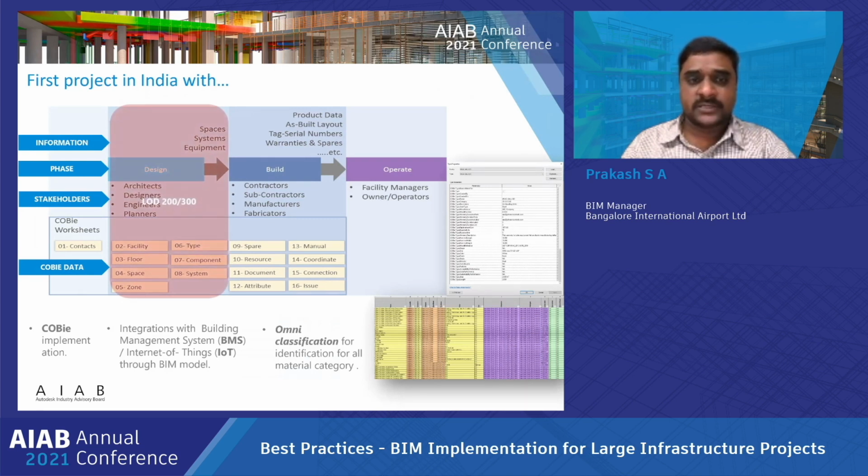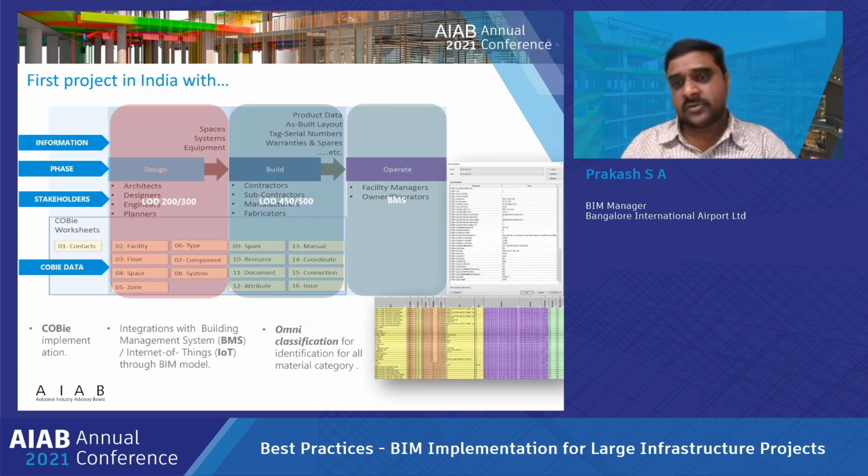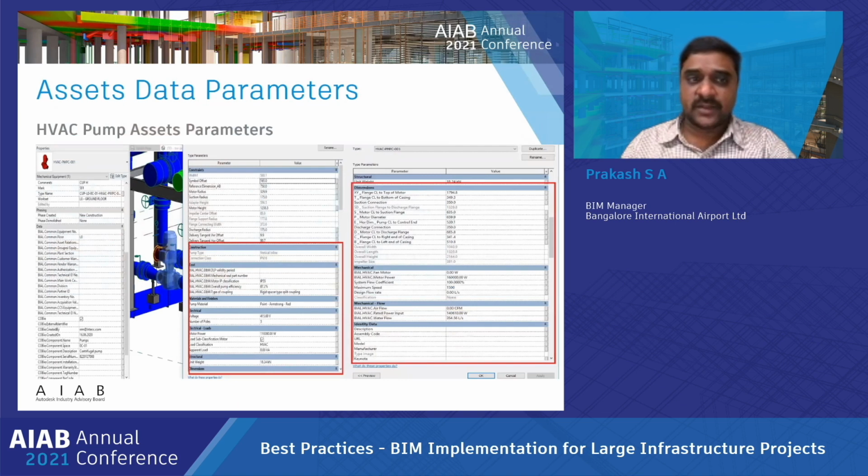and build and operations, and up to what we can see as LOD 300 level, all these disciplines-wise the EPC is going to do it, and after LOD 300 to 500 the particular vendor is going to do it. And again this is going to be the BMS system, all this information integrated with the facility management.